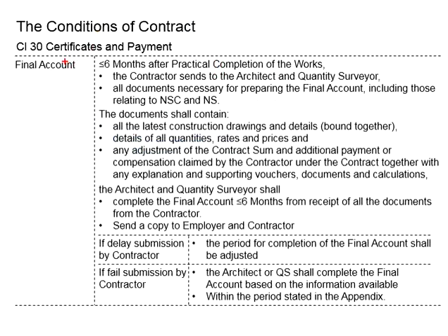Now let us proceed with the discussions on the final account. The final account here will be the last documented account stating the amount due to the contractor. This by right should conclude the entire project, and this shall be done properly in order to prevent disputes. The final figure in the final account shall be made transparent to both sides.